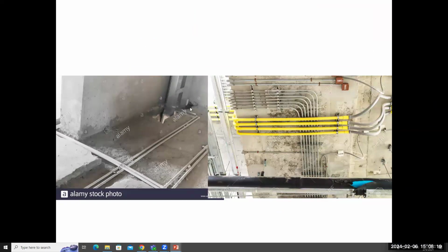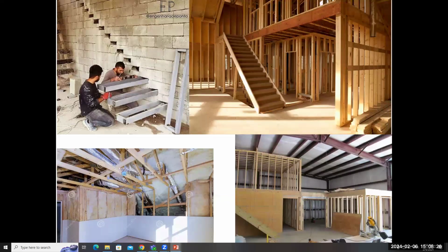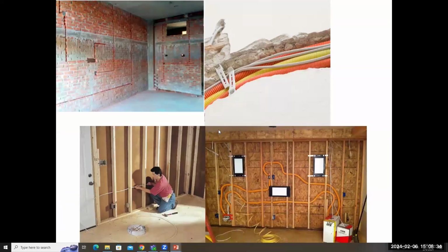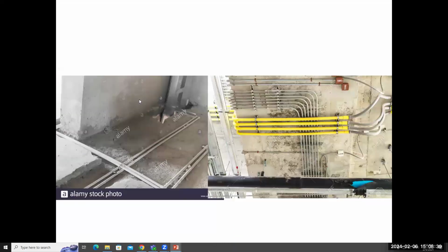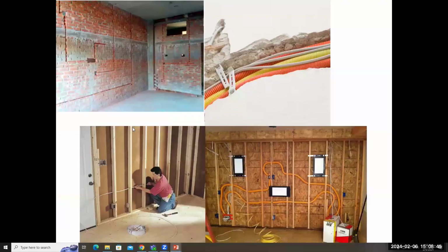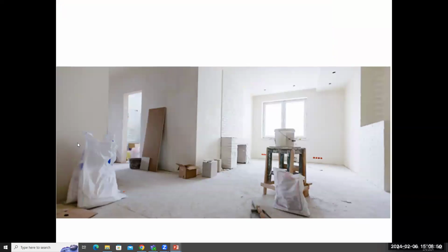Any kind of service line, if it has to be hidden or concealed, is done at this stage before everything has been finished. Then those kind of frameworks, big frameworks from the wood, metal, they're done. And then the site kind of gets a shape. Wiring happens. So you have the frameworks. So first layer, anything on the floor, wall, okay, need to be done. Then the framework's done. Then the wiring or cable is turned, and then all is closed, okay?